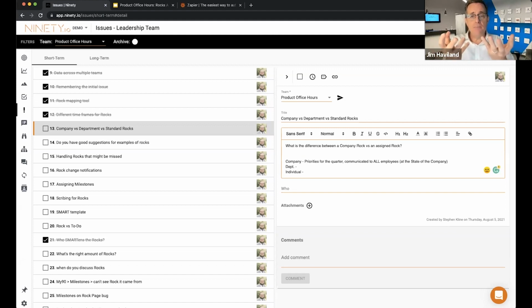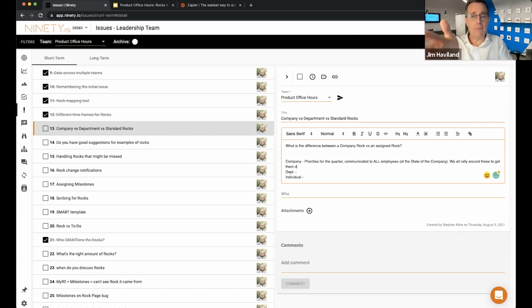And that means, hey, if Christine's got a company rock and it's the most important thing this quarter, and I've got something else, a personal rock that I'm working on, but she needs my help, she wins. I'm going to help out because we've agreed as a team that's the most important thing to get done. So it's a level of priority and a level of visibility, and how we're communicating to the rest of the world. And then it works to the next level down with department rocks.